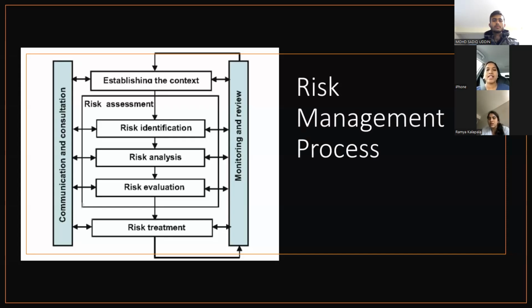The risk management process, according to ISO 31000:2012, is shown in the slide that we are seeing. The stages require specialized software: risk identification and risk assessment. In risk assessment, Bayesian networks and fuzzy set approaches are used along with other multi-criteria methods. The next step is determination of the risk validity and then creation of risk management strategies. It begins with establishing the context, and in terms of risk assessment, we have to do risk identification, risk analysis, and the evaluation of risk, and then a certain treatment is done in order to mitigate the risk. So this is the risk management process.